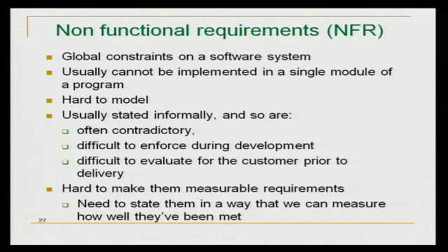We're doing some agile projects at work, and we literally give our customer an update to the interface every month so they can evaluate it, give us feedback, evaluate it, give us feedback. That's one way of addressing some of these harder requirements like usability. But it does take a concerted effort to do that. A standard waterfall approach won't work.